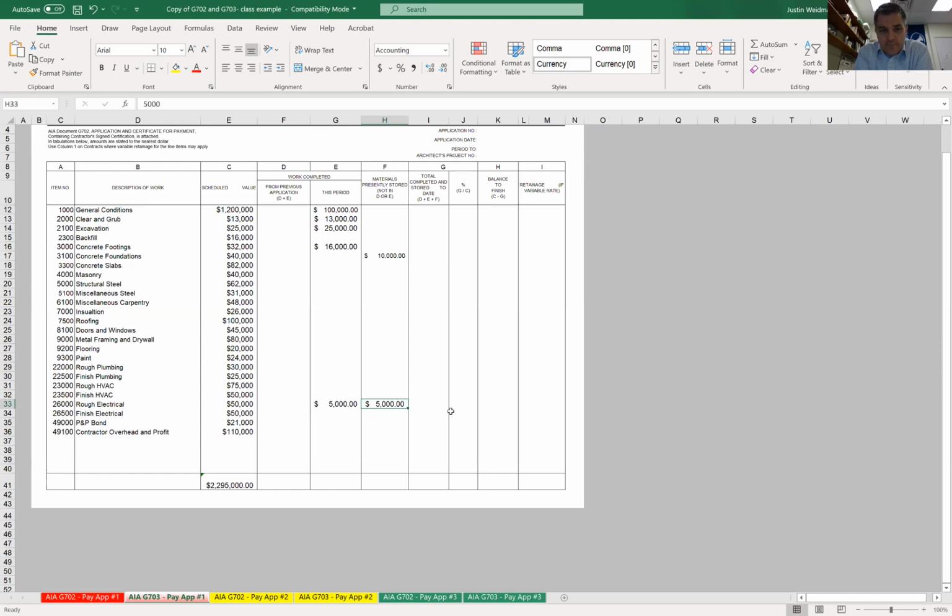So if it's for the BYU Snell building, you would have them marked on those materials, BYU Snell building. You go down and take pictures of it, and you get the insurance information saying that those items are protected, then it's okay to pay them. So even though that work hasn't been put in place, you can still get paid for materials that are stored.